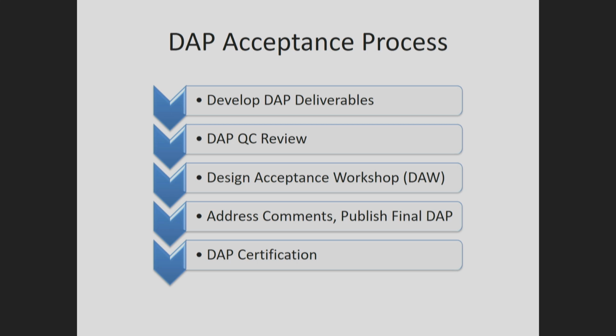We're going to go through a formal certification process by which the tech center manager, the area manager, and the project sponsor, or whoever's paying for it, are on board with that project, and they're signing off on that. They're certifying that everything that's due at DAP is complete and in project-wise, and that through the process of developing that project, we've looked at those things that are going to be potential tripping hazards for the project going forward.